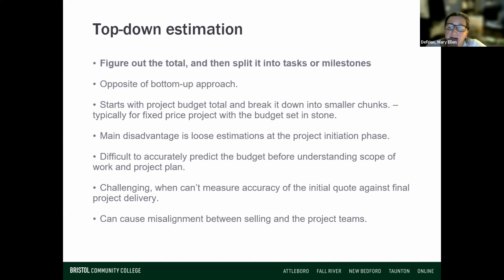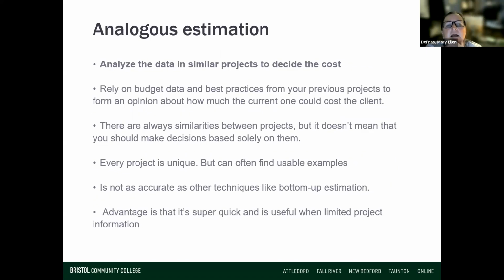Okay, but if the person comes in and you're in that kind of thing, like I will spend $5,000 on this piece of art, but no more. Okay, well, now we know what the total cost can be, and now we back out everything else. So bottom up, top down.